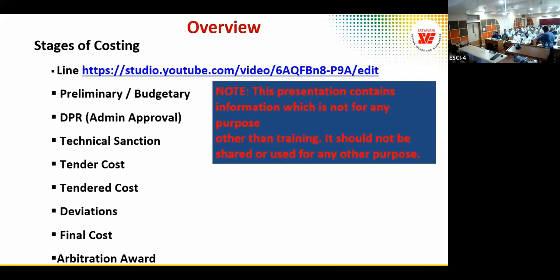That means within structure, we don't look at variation in columns separately, because steel we separate, concrete we separate, formwork we separate. So we look at the overall structure as one component. I give 10 components in the overall project, and in that I look at the variation or deviation.